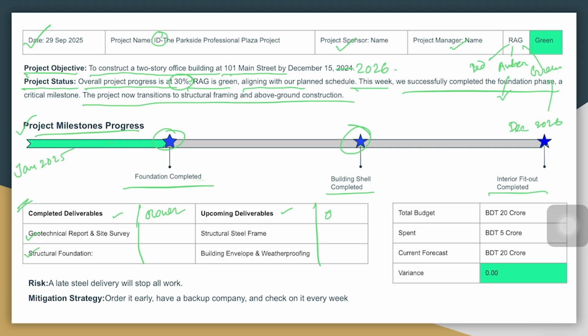You can also put the owner name here, and putting the owner name is helpful because if the sponsor or anybody has questions, they can reach out to them, and also it keeps the owner of the deliverable accountable. By the way, you can also put a date here for when this deliverable will be completed, or what the target date to complete that is.